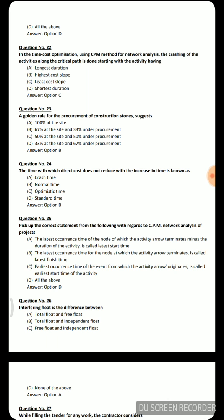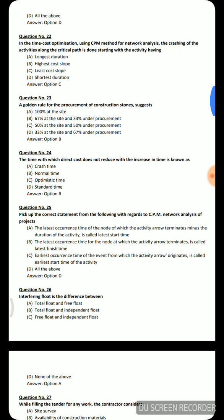Next question: The time with which the direct cost does not reduce with the increase in time is known as — crash time, normal time, optimistic time, or standard time. The correct answer is normal time.